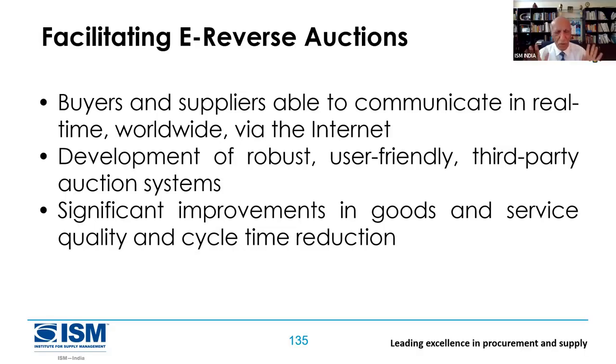Some who feel they cannot do it at 1 are out. But those who feel there's potential and want to get business with you, you will tell them, guys, every round the reduction has to be a minimum of 5%, or 2%, or 10%, whatever you decide. So if I'm doing it around 1 million, with a 5% reduction, that means I have to go to 999,500. Then second round, third round, and then everybody gets exhausted. The lowest price we get is final.